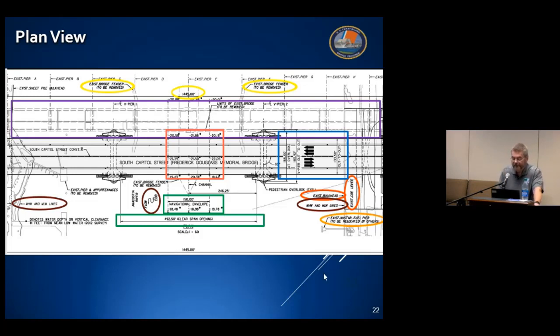The blue box towards the right, meanwhile, denotes the width of the bridge, which in this case varies between 133.5 feet to 166 feet. This bridge project will not have a fender system, so identifying the location of the bridge protective system, piles, cables, etc., that's really not applicable for this particular project. But if it were, those locations would also need to be shown.